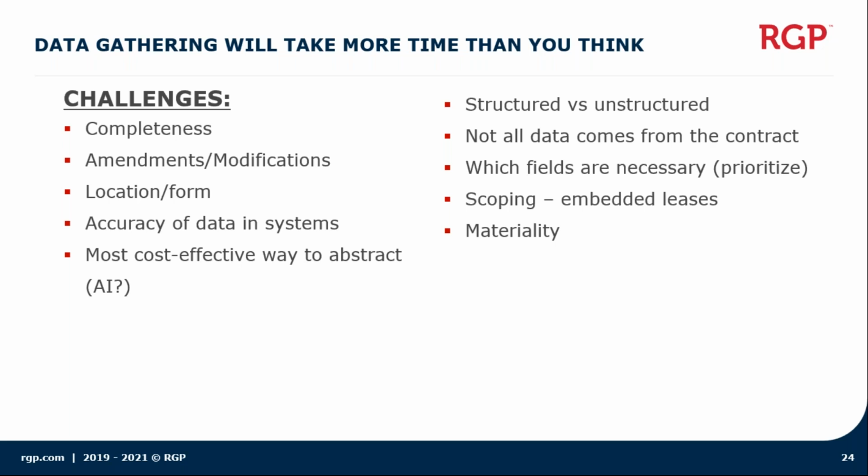You have to develop a process to not only capture the initial data that you've assessed during your assessment phase, but also all the incremental data that is always changing throughout the implementation process.